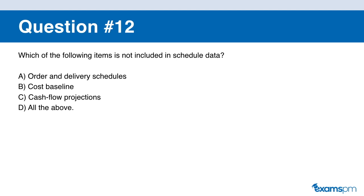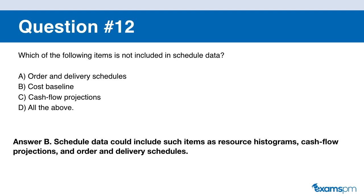Number twelve. Which of the following items is NOT included in the schedule data? A: order and delivery schedules. B: cost baseline. C: cash flow projections. D: all of the above. If you said B, you are correct. Schedule data can include resource histograms, cash flow projections, and orders and delivery schedules — but not the cost baseline.